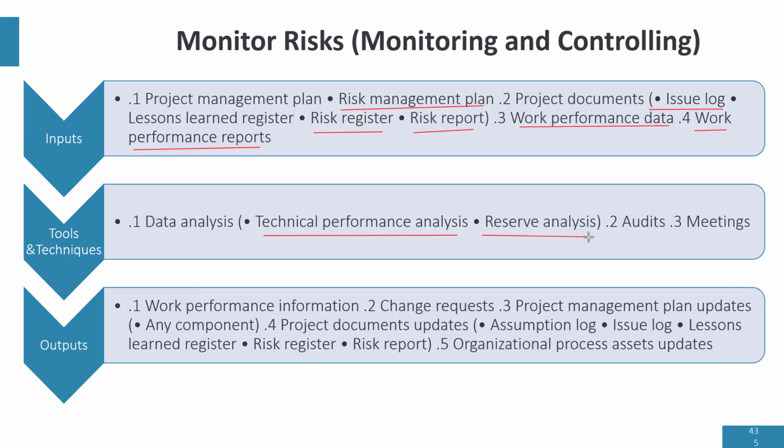Reserve analysis is where we decide whether we need to modify our contingency and management reserve. If new risks are being identified, you might need to add more to your contingency reserve, and so based on the nature of the risk, we can analyze the contingency and management reserve. Let me talk about meetings.